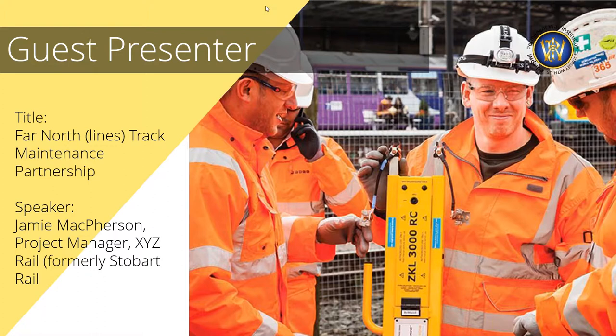What ones do you want us to change? As you can see, we're well packed, so we still kept the track alignment until the tamper at the end. But instead of trying to increase life expectancy, we tried to say to them, well, instead of official 1 and 3 and taking out sleepers which maybe don't need to be taken out, let's focus on the ones that need to in order to improve the track so there are fewer revisits later in life.